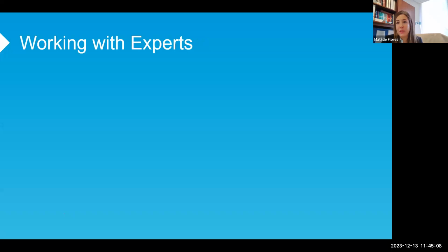I think it's advisable to start working with your experts early. So while the lawyers are working to either prepare their claim analysis or prepare their defense, and definitely before the first round of written submissions is filed. I think the more familiar the expert is with the factual background and project documents, the better his opinion and report will be. And also when you're preparing a case, your experts can actually help you identify gaps in the factual record that may need to be filled by witness statements, for example, or provide insight that may impact your legal submissions.